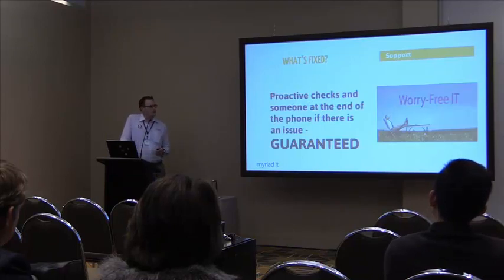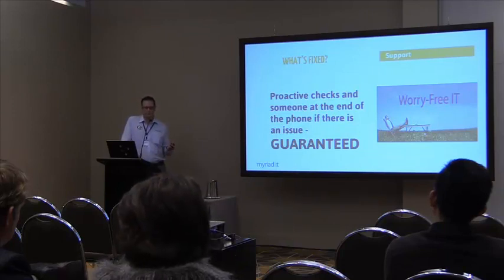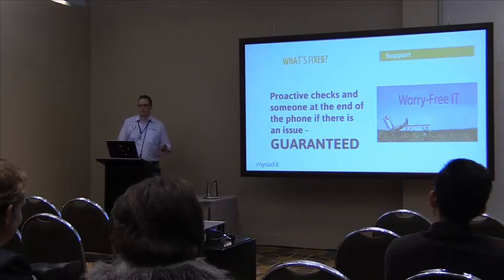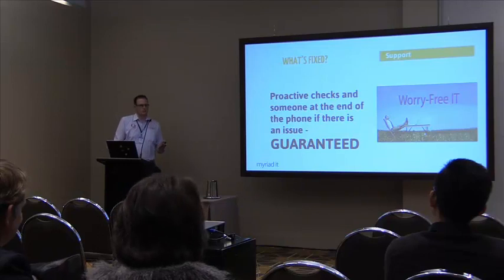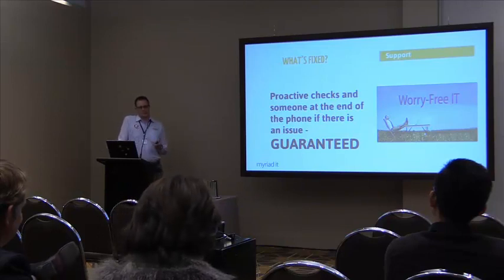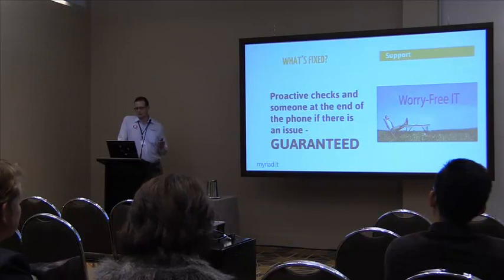And the last one's support. In terms of support, generally you're looking at hypercare afterwards: a couple of weeks of dedicated support on site, 1 to 2 consultants, because you're going to get the response straight away and get things fixed. If anything comes up, I know I'm going to have the required resources there, straight on top of any issues.